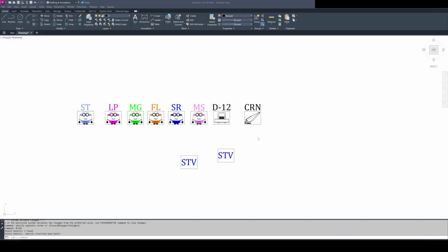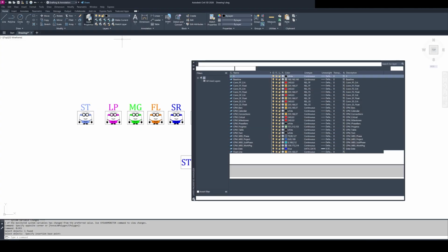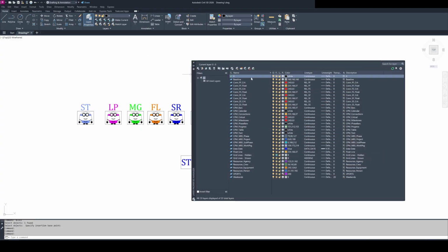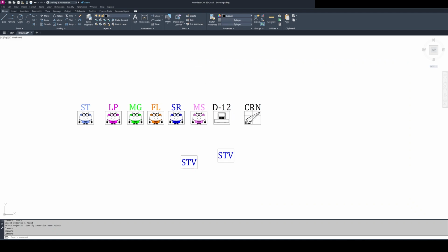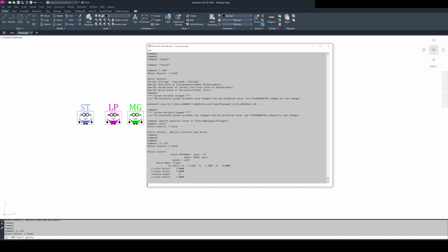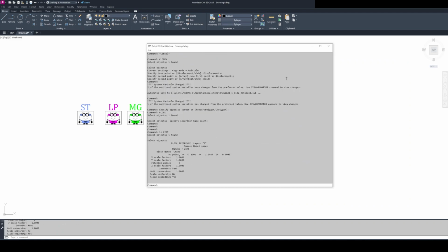One important detail, draw your block geometry on layer 0 with properties set to by layer. This is standard AutoCAD practice, and it matters here. When CPMCAD inserts a block reference, it places it on the appropriate resource layer, CPM Resources Equipment, CPM Resources Person, etc. If your block geometry lives on layer 0 with by-layer properties, it inherits the color and properties of that resource layer.